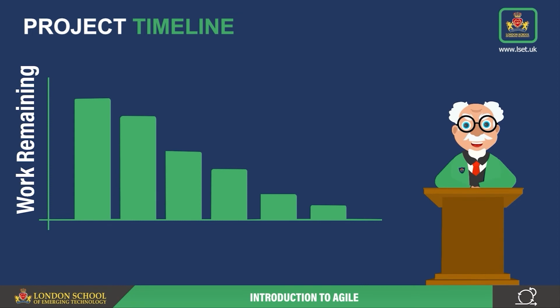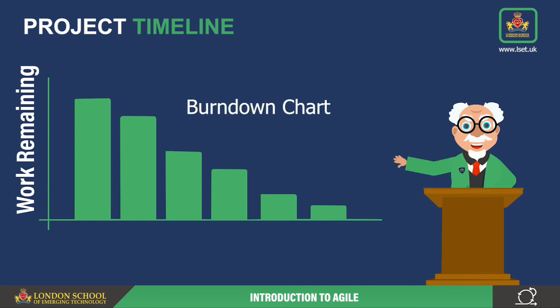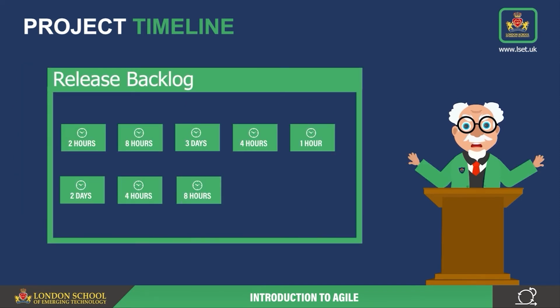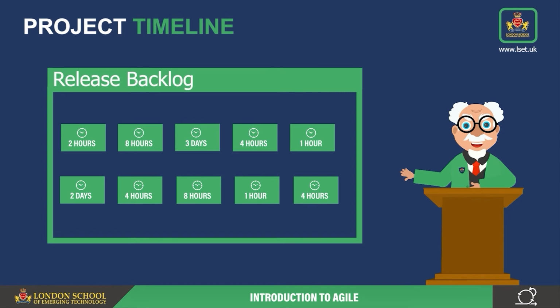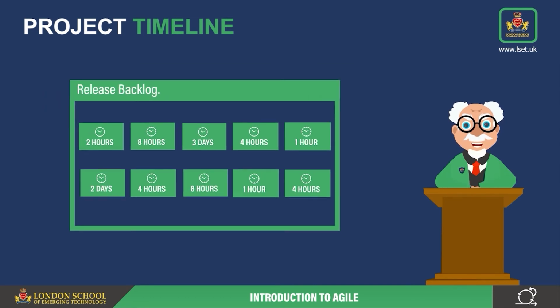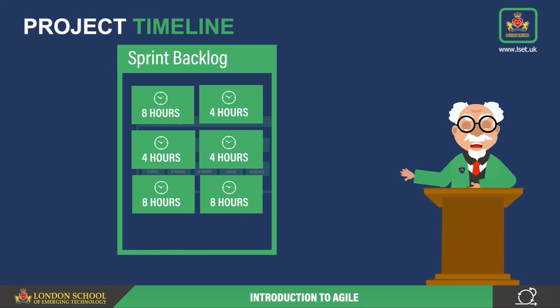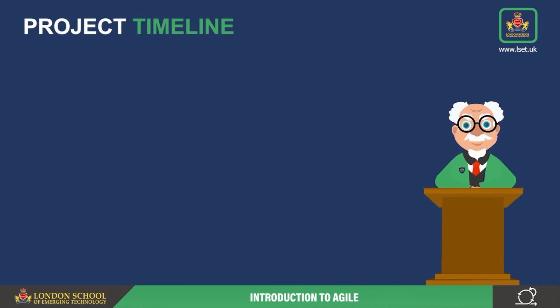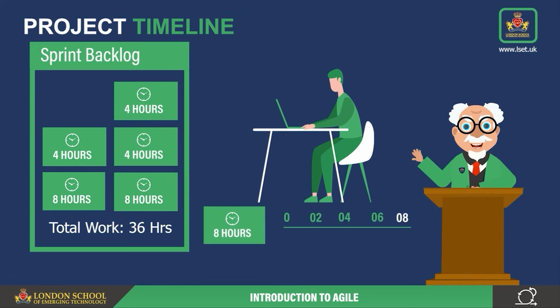First, let's talk about where the data for this extremely useful burndown chart come from. As we have learned earlier, during the release planning process, an estimate was created for each user story in the release backlog. For each sprint, these estimates represent the total amount of work to be done to complete the sprint. As each team member progresses on one or more user stories, they update the amount of time remaining on each user story they worked on.